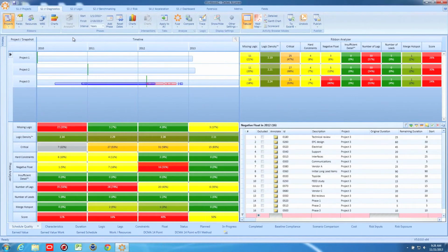What if you want to know how your enterprise quality is? Or, to use the example that I've been using, my location. How do I know how my different locations are scoring? Let's look at these project scores. 26%, 30%, 24%. These look like my grades in high school. You know, these aren't very good. What we like to see from these scores, project by project, is 75% or higher. And we're not seeing it here. So we have some root cause analysis to do.